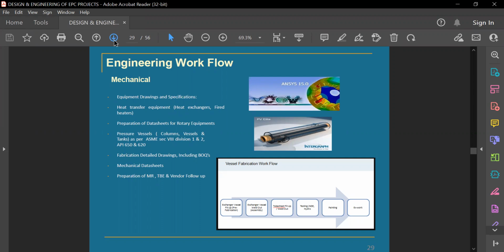At the end, everybody will make the data sheet and specification, we make the material acquisition and get the offers, and they do the technical evaluation. And once the order is given, they do the vendor data review. But they have their own documents, their own data sheets, their own perspective, their own aim to purchase their own required discipline items. So this is the engineering workflow for a mechanical engineer.